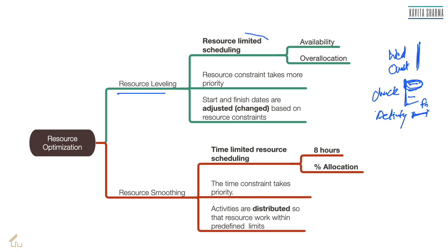I know my resources are limited, and I go ahead and check when the resources are available, and I change the start date and end date of the project activities based on the resource which is available only at that point of time.